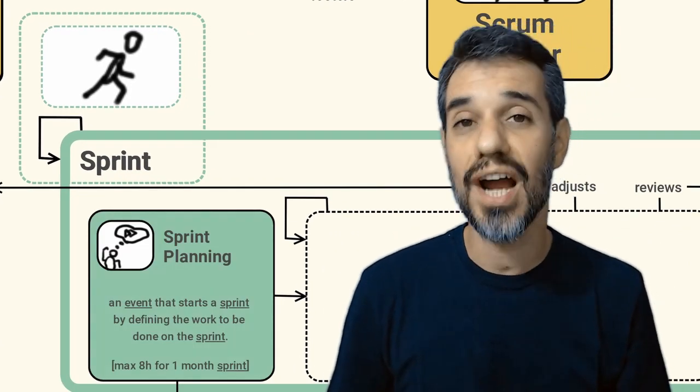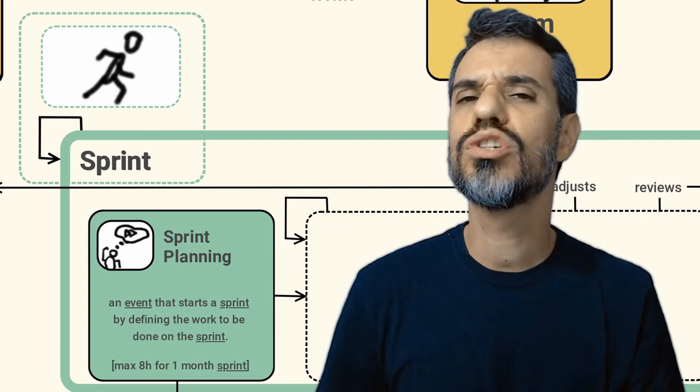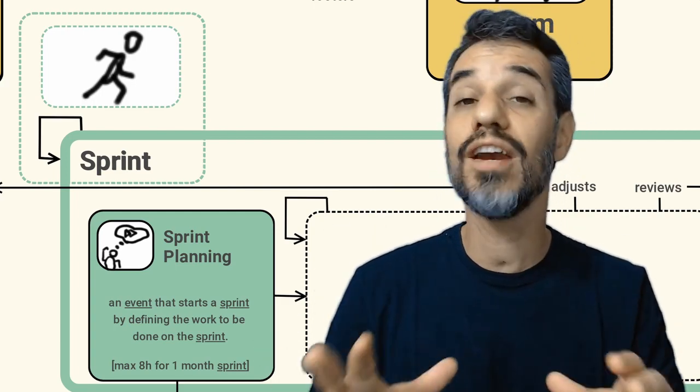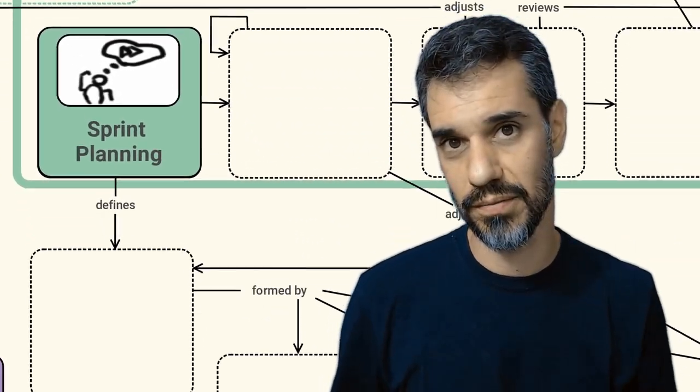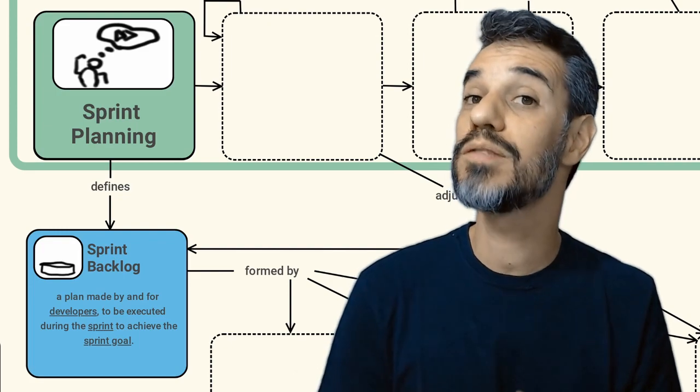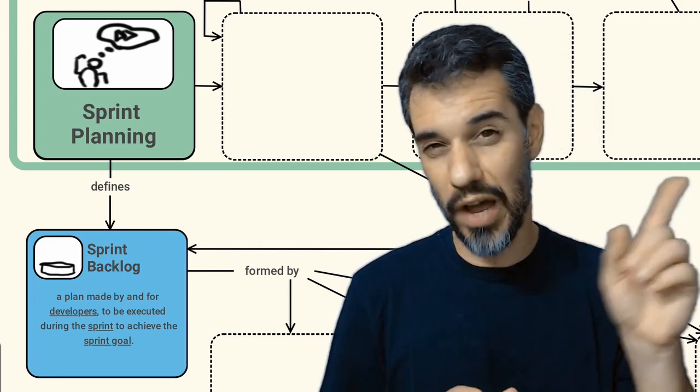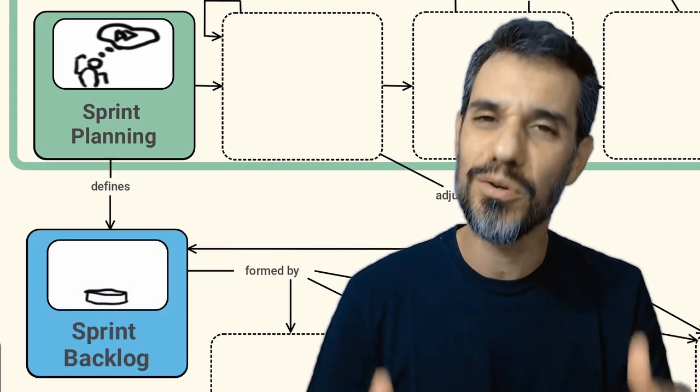Every sprint should start with a sprint planning. At the sprint planning we should plan and define all the work that's going to be delivered by the sprint. The sprint planning defines what we call the sprint backlog. A plan that's made by those developers and that's going to be executed by them.